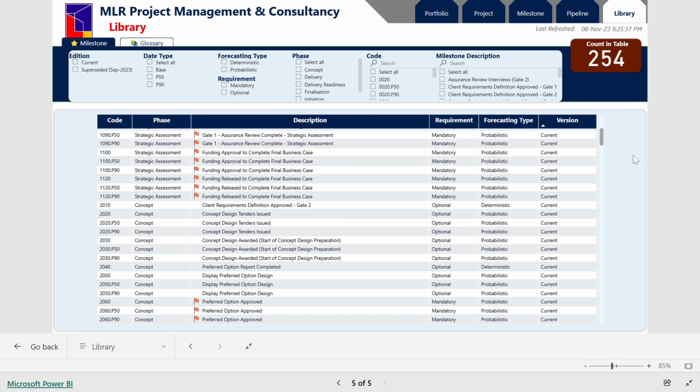And if you have a question in mind, like how about updating the contents of this dashboard, it's really easy. It's just basically updating the schedule in P6, extracting the data and dumping it into a folder, refreshing the dashboard, and everything, the contents in the dashboard are refreshed.